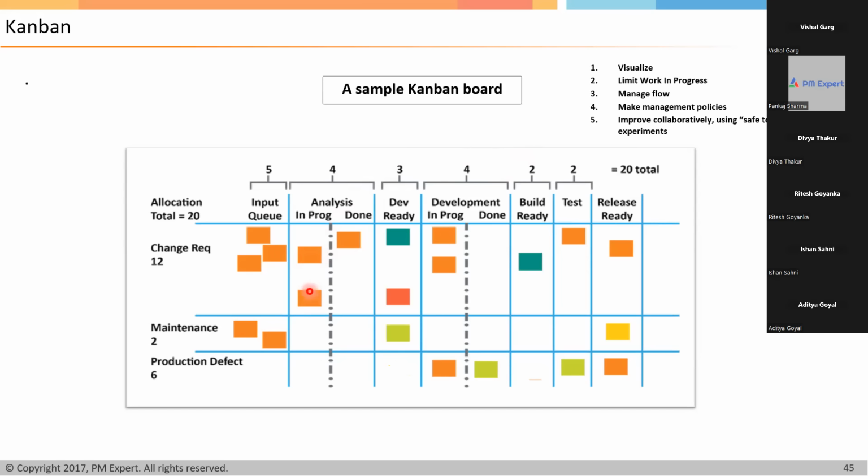We'll say, okay, in order to move these 4 items, if you're maintaining 4 as a WIP, it takes on average this much time. So when we actually use the formula of cycle time in Little's law, we use average cycle time and the WIP. In average cycle time, we are able to complete WIP. So in unit time, we'll complete WIP by cycle time. Is that okay?